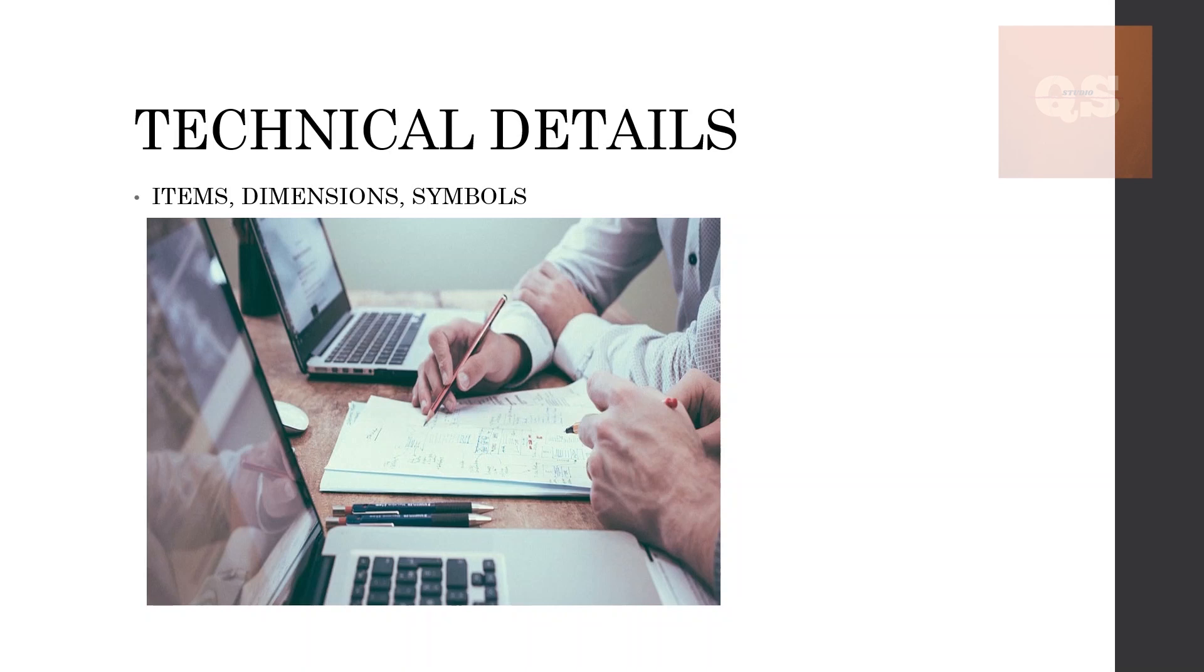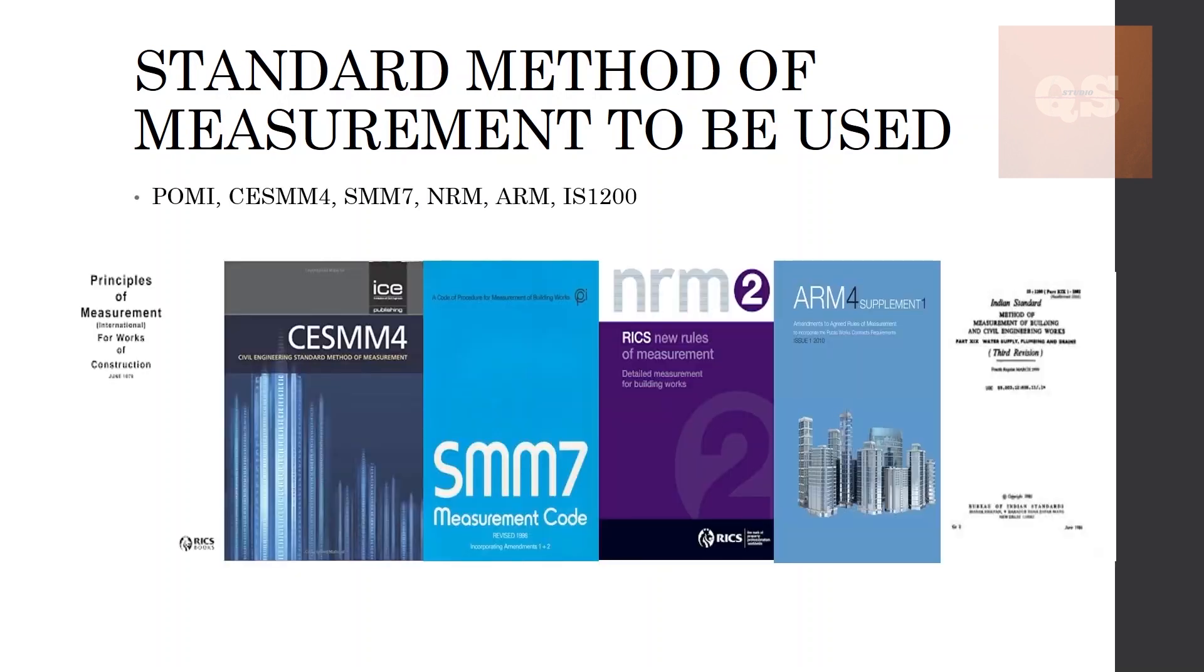Finally, you have to get the standard method of measurement that needs to be used for this project so that you can prepare the BOQ accordingly. There are different types of standard methods like POMI, CESMM4, SMM7, NRM, ARM, IS1200 that is for Indian projects.